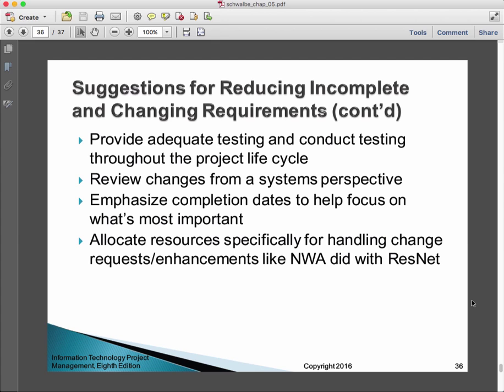And in a week or two, it would come back and we would say, okay, it looks like the impact is going to be this. Do we still want to do it? And of course, we could decide to incorporate it in the project plan, or we could decide to boot it forever or to put it on the pile for the next project. And what was really nice was that people saw that even analyzing these things had a cost, and that the project had to pay for that. And it was just really, really, the dynamics were really, really healthy.